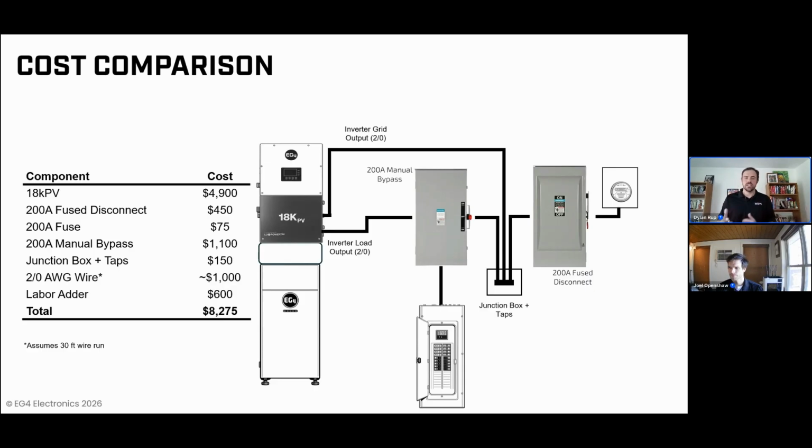Certainly this will vary project by project, region by region, and then as you start to add in all the additional aspects of deploying an energy storage system, that labor number will be significantly higher when you consider things like installing the battery, commissioning the system, installing the solar, etc. That said, all this information taken together on, again, the AC integration only of one of these energy storage systems, providing a 200 amp whole home backup, the cost to deploy a 200 amp internal MID based solution is going to run well over $8,000 when you also include the cost of the inverter.